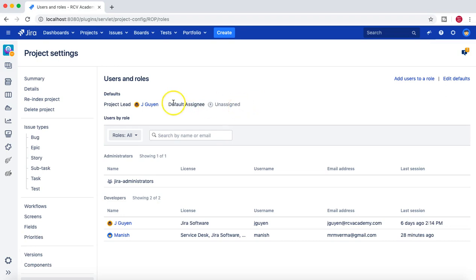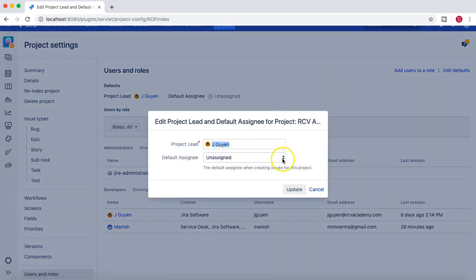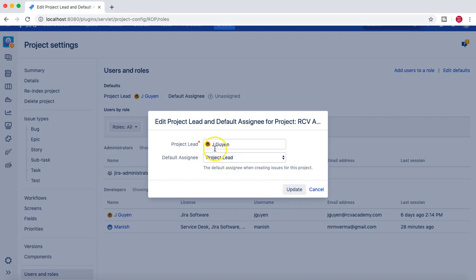The project lead is JQN and the default assignee is unassigned — that's the reason issues in this project are unassigned when created. You can change it by clicking 'Edit Defaults', clicking the default assignee dropdown, selecting 'Project Lead', and updating. Whoever is the project lead for this project will by default be assigned the issues.